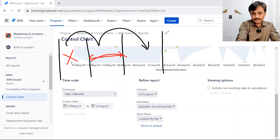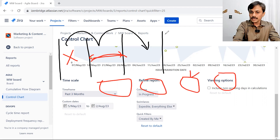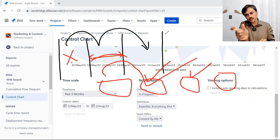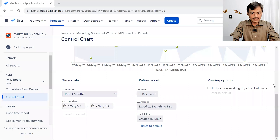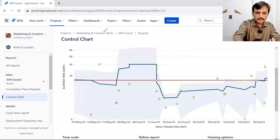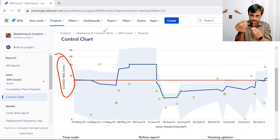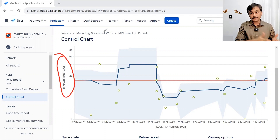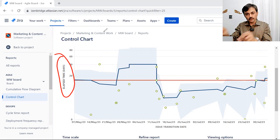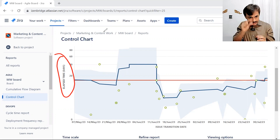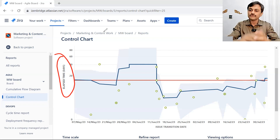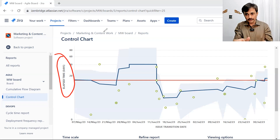If you have four columns, you can find the cycle time for respective columns based on arrival and departure — all the calculation and trend will be based on that time window. The elapsed days shown are basically the cycle time, which depends on which columns are selected. For example, if you have a Development stage and a Test stage, you can select only Development to see how long the development cycle takes, or select Test to see how long testing takes. This helps identify how long things are staying or getting stuck in a particular stage.